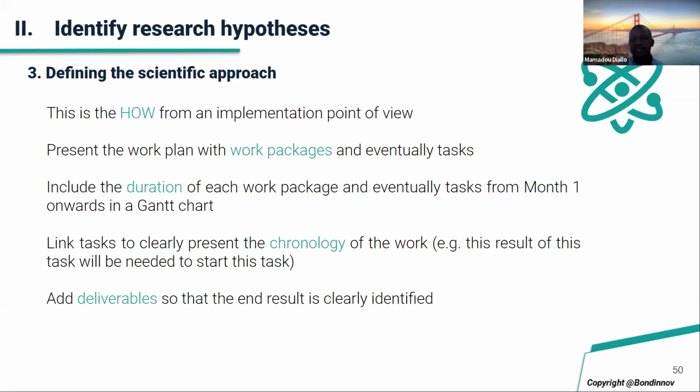Of course, I said that every objective is associated with a task, and every task has to be done over a period of time. You will not conduct all the tasks at the same time, but one after another. Maybe some tasks can be conducted simultaneously, but they follow an order. That's what you have to do in the Gantt chart. Add deliverables so that the end result is clearly identified.